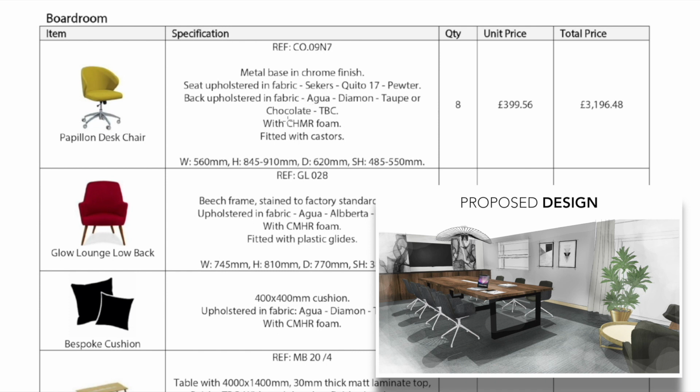So on this particular chair, we were still in discussion, but because it's the same collection, the Diamond collection, the color really doesn't matter when you are talking about the price, because usually the same collections cost the same. Later on, when it gets to actually ordering the whole thing, the supplier or the rep would just come back to the designer and double check these things and update the quote and reissue again.